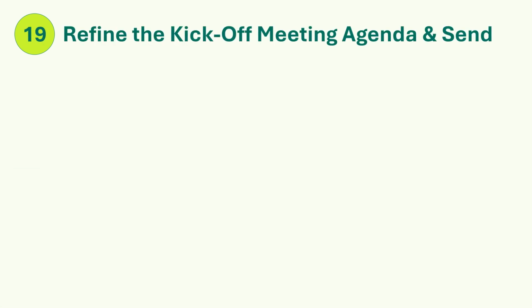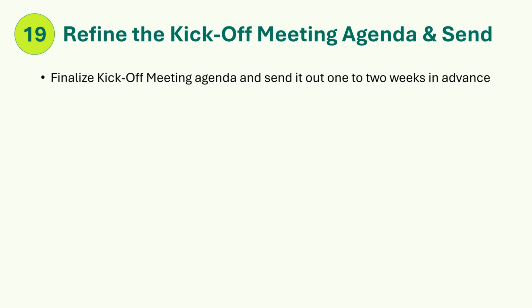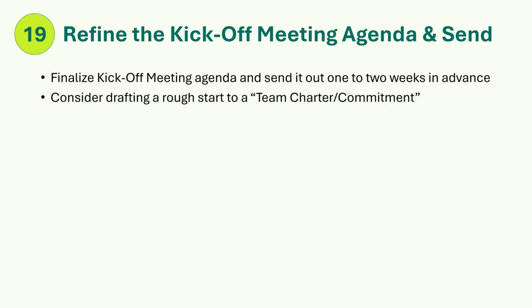Step 19. Refine the kickoff meeting agenda and send. Finalize the kickoff meeting agenda and send it out to all invitees 1 to 2 weeks in advance of the meeting, so everyone has time to prepare for the meeting. Consider drafting a rough start to a team charter commitment that can be presented at the kickoff meeting for everyone to react, edit, and contribute to during the meeting.